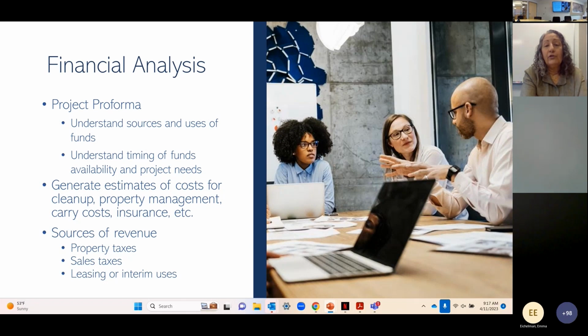And there are other metrics that investors have for the returns they're expecting for investing in a real estate development transaction. But IRR is the big one. And again, timing really influences it. So a project pro forma that is not just a static model, not just, I'm going to put this much money in and I'm going to get this much money out at the end, but that actually looks at the time it takes to do that and spreads those costs out over the time when they're expected to be incurred, is very critical.